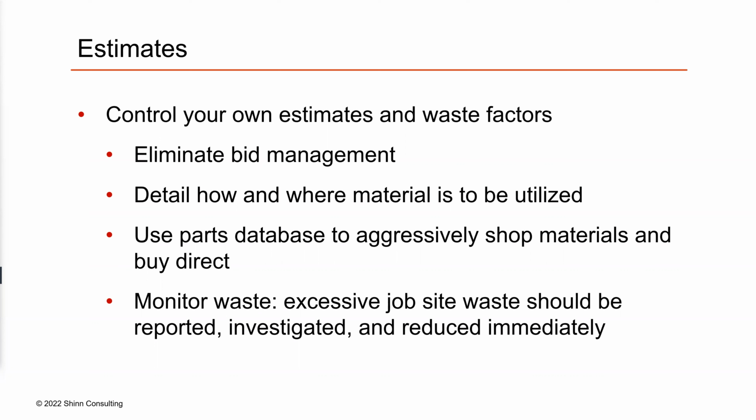Yep. So the next thing we want to do is focus on not just creating our estimates, which are going to transfer to our purchase orders. We want to make sure that we're very detailed on how and where our material is going to be utilized. So if I'm going to go out and buy drywall direct, I'm not just going to have those sheets of drywall show up for my drywaller. I'm going to make sure my drywaller understands how I did my estimate. I'm going to make sure they know that we don't cut full sheets in closets. We're going to go through the rules with them to make sure that they understand how to use my material correctly, so that they don't need the waste that they're used to having.